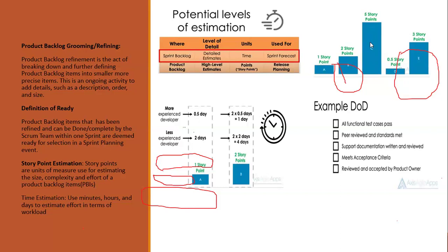And the same thing happens here. The whole development team, the front end, UI, and maybe the tester, everybody will assemble together and look at this. Based on the volume of work from the acceptance criteria and everything, and the risk based on previous experience, they will say, okay, let's give it 3 story points, 4 story points, and all that, right?